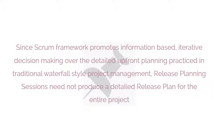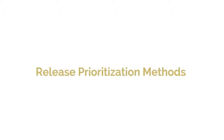Since the Scrum Framework promotes information-based iterative decision-making over the detailed upfront planning practiced in traditional waterfall-style project management, release planning sessions need not produce a detailed release plan for the entire project. The release plan can be updated continually as relevant information becomes available.